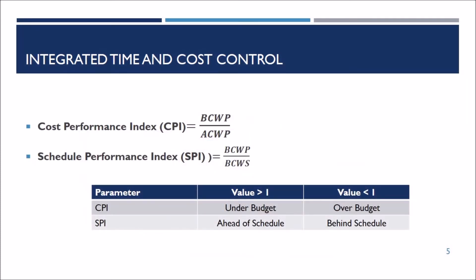To measure the efficiency of expenses spent on a project, the cost performance index (CPI) is calculated, which is the ratio of earned value over actual costs. The schedule performance index (SPI) is the ratio of earned value to planned value. If the SPI is less than 1, it indicates that the project is potentially behind schedule. But if SPI is greater than 1, then the project is ahead of schedule. Similarly, if the CPI is less than 1, then it indicates that the project is potentially over budget, and if CPI is greater than 1, then the project is under budget.